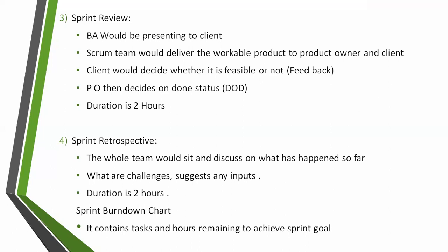Any doubt? I have a doubt in this sprint review. Sprint planning is before the start of the next sprint, that is clear. This is a time box event of 4 hours.